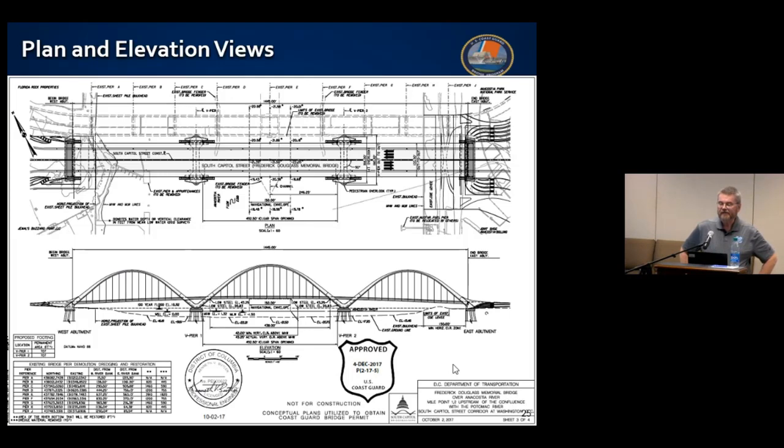Yeah, but they did note the mean high, mean low water lines. That's really three things we're looking for, at least in tidal waters: mean high, mean low, 100-year flood. Non-tidal water may be looking at ordinary high water, ordinary low. And the negative numbers at the waterbed, that's to show how much, I don't know what the bottom part of a boat is called. How deep in the hull? The keel. Yeah, okay. That's beneath the keel, yeah. Okay, cool, thanks.